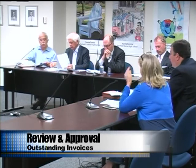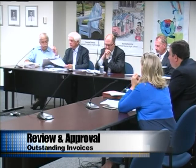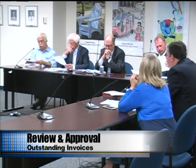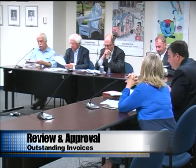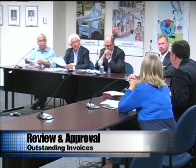Well, what is our... I haven't seen that yet. I have it all. I'll send it to you tomorrow. Actually, you sent it, right? It was already out. Well, our agenda item that we acted on was review and approve scope and cost for the handrail redesign. Just cost. I know, scope and cost. Okay, we'd be happy to have you reopen and come back, but no, that's fine. What typically happens is it's submitted through Colliers, and it gets reviewed, and it goes to the Finance Subcommittee. I'm just letting everyone know, as the Finance Subcommittee had not reviewed that in detail.